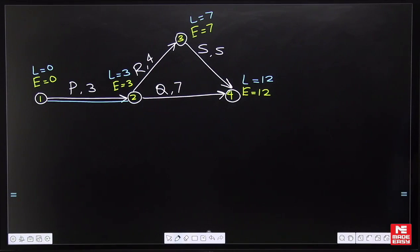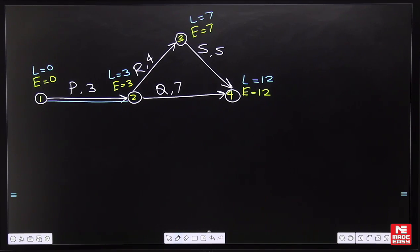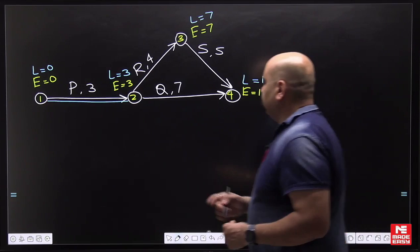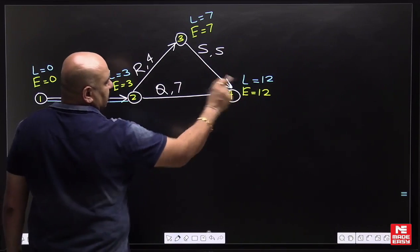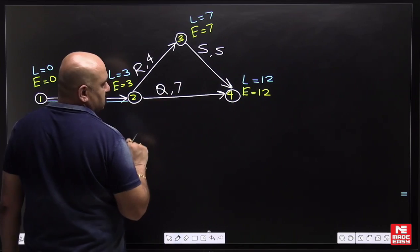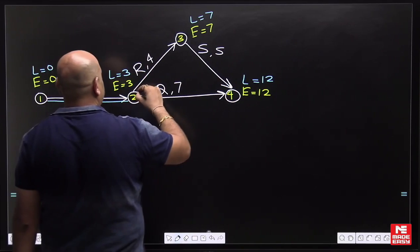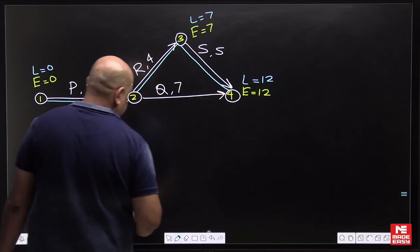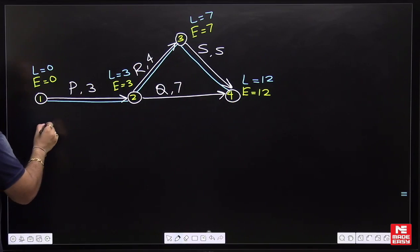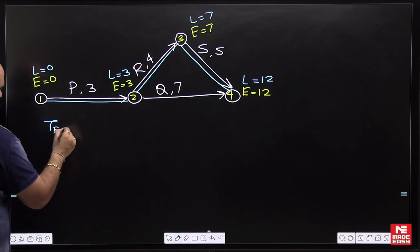For critical activities, three conditions are required: head event slack should be zero, tail event slack should be zero, and their difference should equal the activity duration. Activities satisfying all three conditions form the critical path. For activity 2→4, tail and head event slacks are equal but 12 minus 3 is not equal to 7, so it is non-critical. The critical path is determined accordingly.